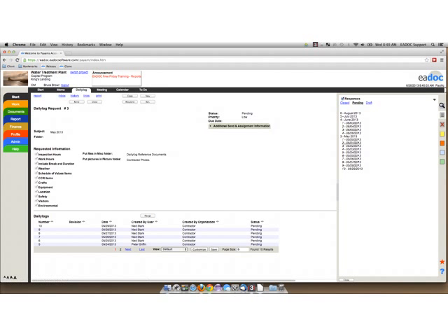If you are deciding to just do one daily log request for the entire project, you obviously know that you're going to have a long list of daily logs in your pending folder that you won't be able to clear out until the end. You don't want to close that request out until you're finished filling out daily logs on that request. So if you do one for the whole project, you're going to keep that daily log request open for the whole project. If you do it by month, then you're just going to close them out at the end of each month. If you do them per inspector, then once that inspector's done, then you would just close out his daily log request.